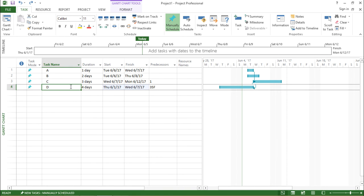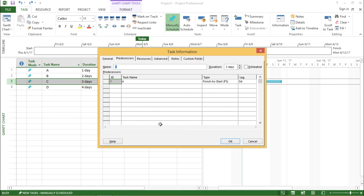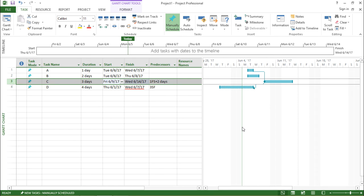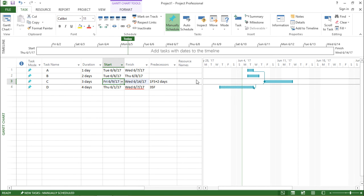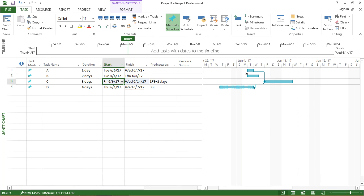These were the types of predecessors — we have covered all four. Now, next to the predecessor type, there was something called lag. Let's understand what lag is. I'll go to task C and double click on it. A window will pop up. I'll take task A, go to the lag column, and select two days. After selecting two days, I hit OK. On the right-hand side, the start date for task C has been pushed to Friday, meaning it will start two days after finishing task A, which finishes on Wednesday. So adding two days after Wednesday gives us Friday. That is the lag — after the finish-to-start relationship, there is a two-day gap, so task C will begin after two working days.